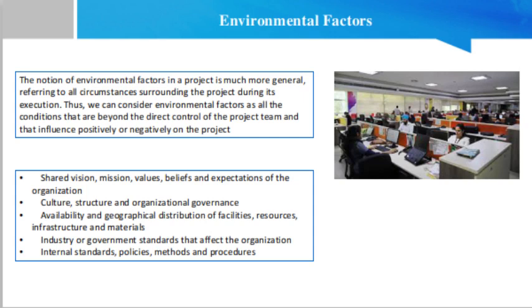Human resource environmental factors are existing human resources, skills and knowledge, personnel management, motivation systems and incentives, perception of leadership, hierarchy and authority relationships, organizational risk tolerance, project stakeholders and organizational stakeholders. The technological environmental factors are operational environments and company authorization systems, the formal and informal communication channels established in the organization, available databases, project management information systems.